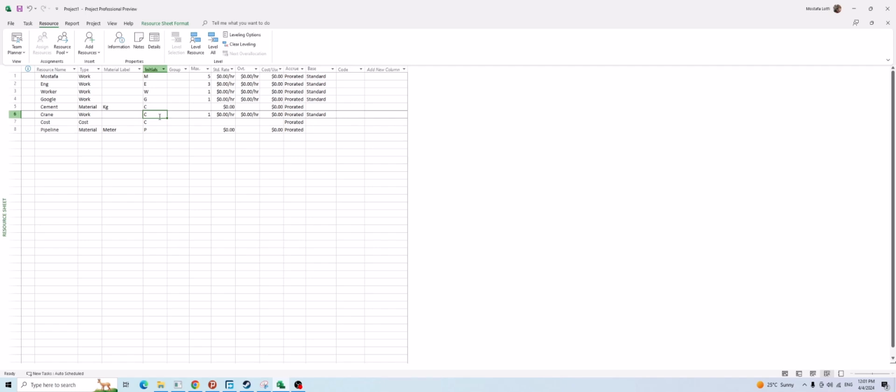And yes, I know what you may have on your mind, that you may say, in reality, how we plan to receive the material is not aligned with this assumption, because Microsoft Project assumes that when you start the work, you will have all the material that you need to complete that scope. But you say it is not the case on an actual project, because we receive the material partially, and over time we receive the complete material. How can we consider it in our planning?